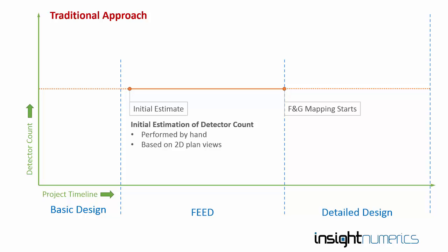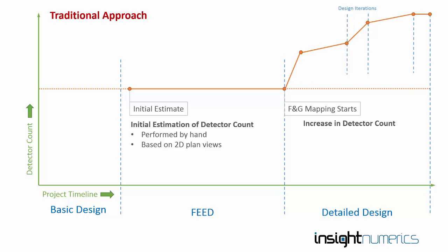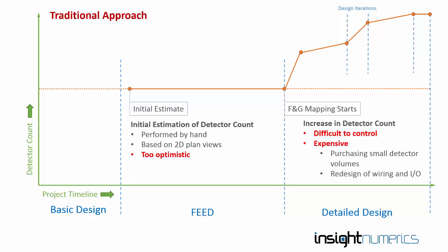This discrepancy inevitably leads to an increase in Detector Count soon after the fire and gas mapping has started. Our EPC customers tell us that over the past few years, this increase has continued as each design iteration results in an increased Detector Count. The problem here is two-fold. First, the initial estimate is too optimistic because it's based on very simple techniques. Second, EPC companies have traditionally had to submit to black box results produced by the in-house software of fire and gas mapping consultancies, and therefore have had little control over the rising detector counts and associated costs. These two problems are very common, and I hear them very consistently.